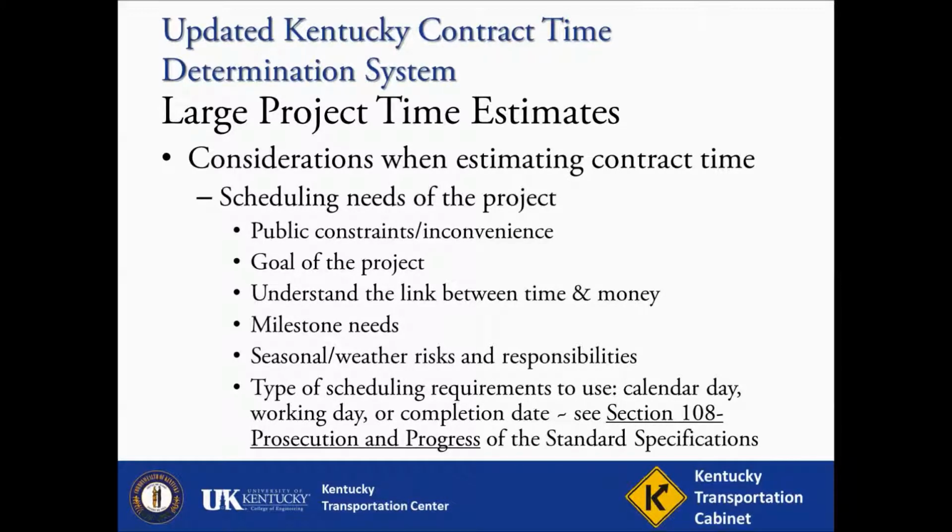The answers to the previous questions can also affect cost. If there can be flexibility given to the schedule, it is likely that lower project bids will result. On the other hand, if by necessity the schedule is not flexible and needs to be constricted, it is likely that construction costs will escalate.